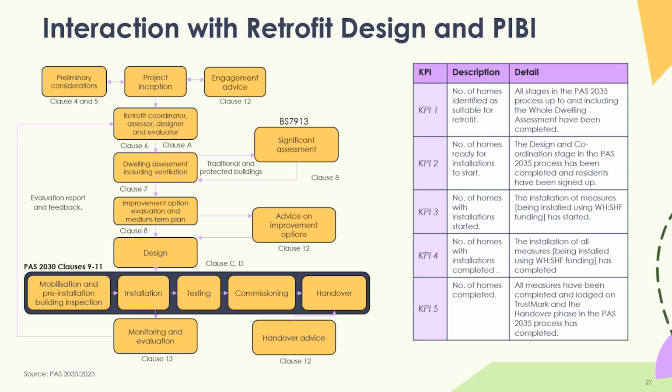So for instance, if you've got all the retrofit assessments done, it's a big row of terraces, and you've done some pre-installation building inspections on a couple of those, but they're all the same archetype, then I would suggest that, in terms of the accuracy of that information, you could probably say that KPI 1 is met, and we're confident in the starting and ending EPCs, we're confident in the measure mixes, we're confident in the costs. That would be fine.